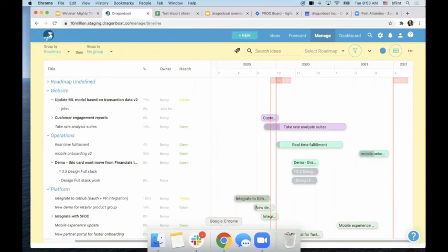They're extra large projects that we know are going to take, extra larges are usually over 16 weeks. So we know that we'll need a developer during that time, and we'll need QA during that time because we are in an agile state. So you would need that developer for that length of time. Right, through the whole thing, off and on.